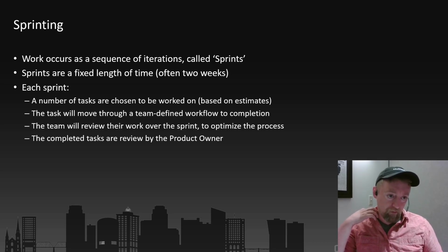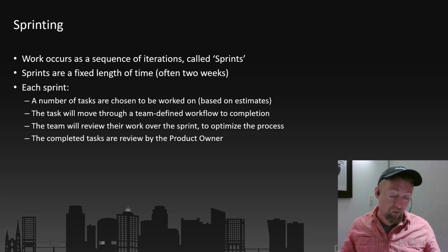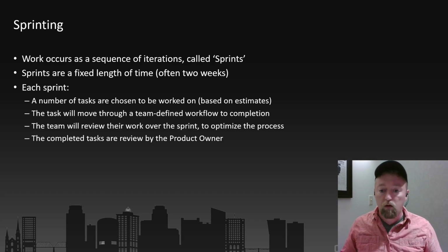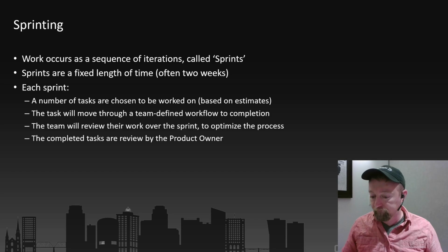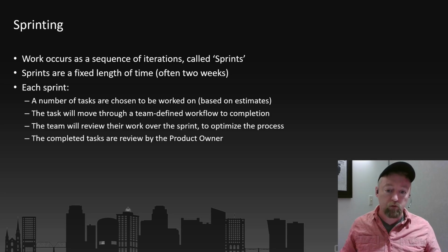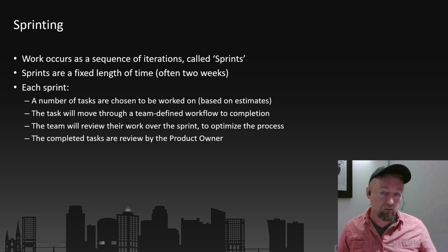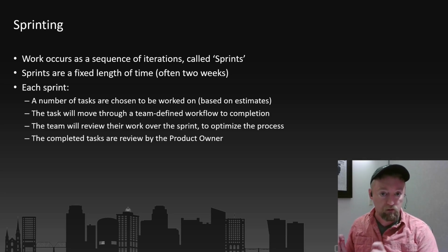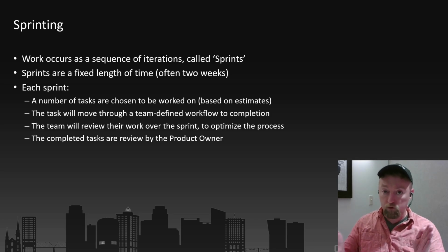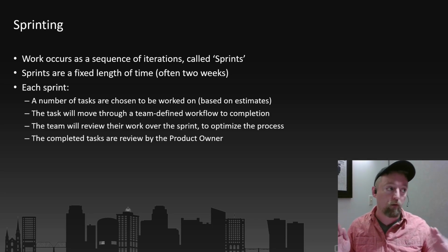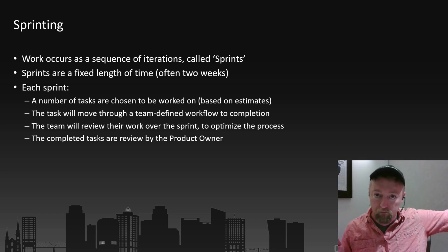Adjustments do come with costs, of course. Anytime we change, we risk losing some of the work we've done. That's the biggest one, but we can do it. The point of this isn't to eliminate the cost of changing our path or changing our way of working. It's just to reduce it as small as possible. We're only working for 2 weeks at a time, so in theory, the biggest risk is that we lose 2 weeks of time rather than that big 3, 6, 12 months that we talked about before.